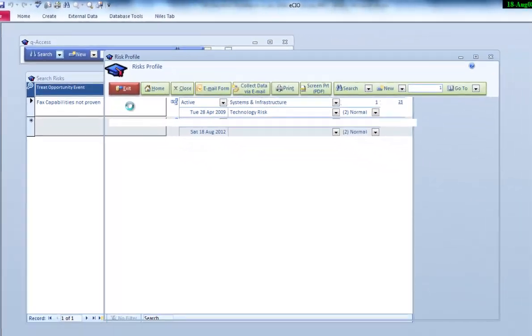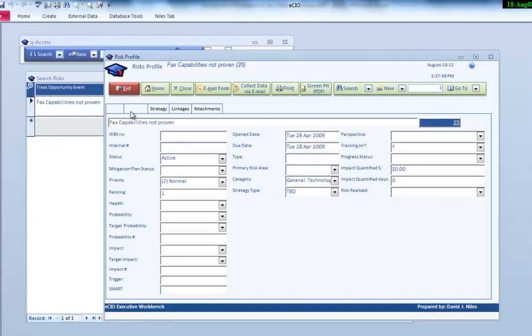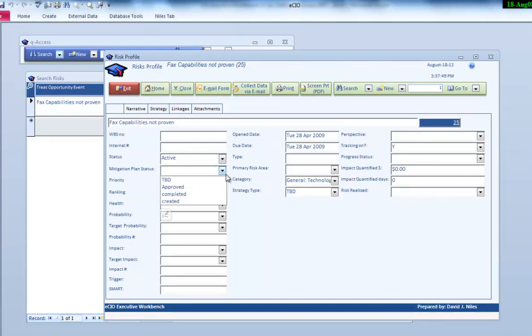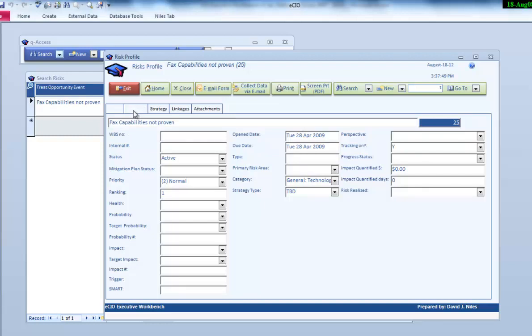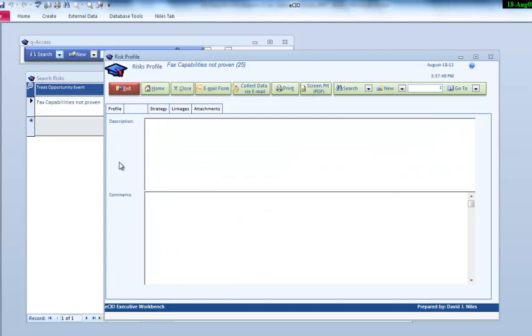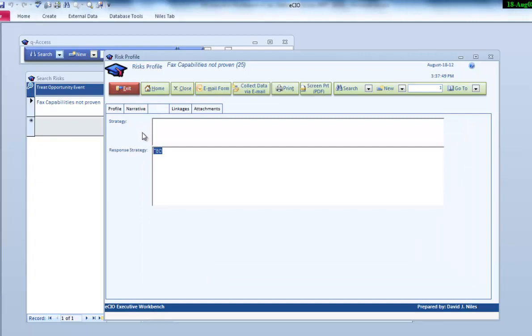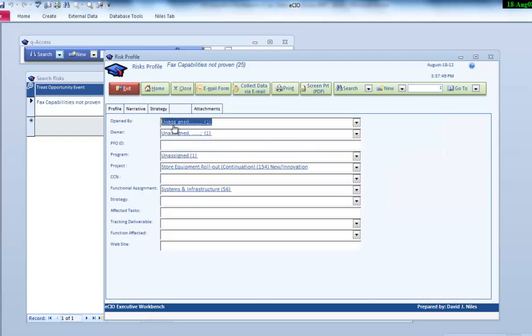Here's the information that we collect on our particular risk: mitigation plan status, whether it's been approved or not approved, the health, target probabilities, the date it was opened, impact in dollars that we may want to calculate, overall description, some comments, and a strategy to approach how we're going to manage the response.